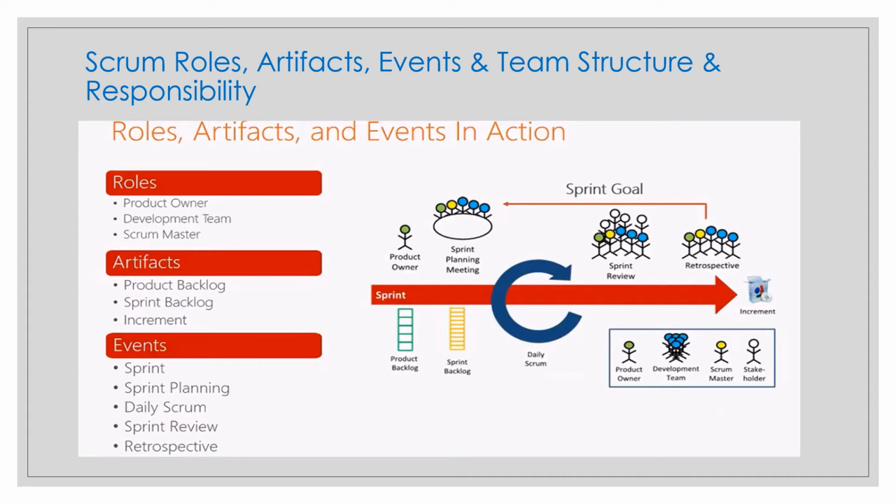During sprint planning, the developers will select a list of items from the top of the product backlog to work on during the sprint, turning them into a potentially releasable product increment, as per your DoD. A product increment is simply a new version of the same product. So every increment will complement the previous version.